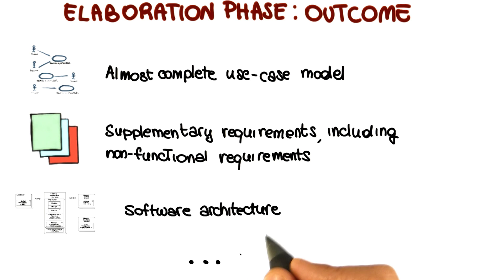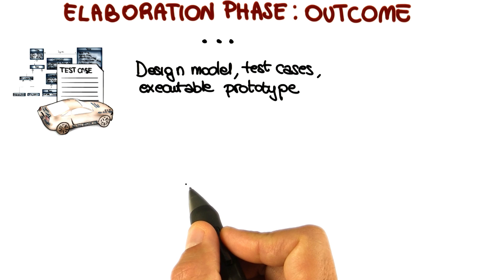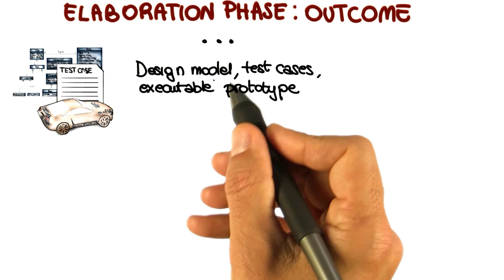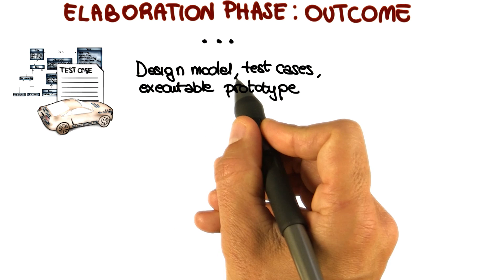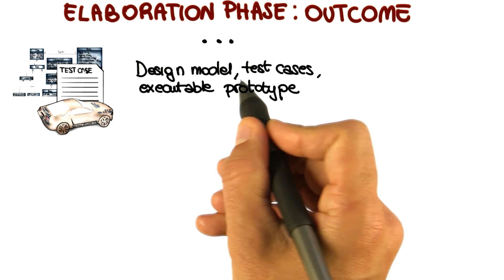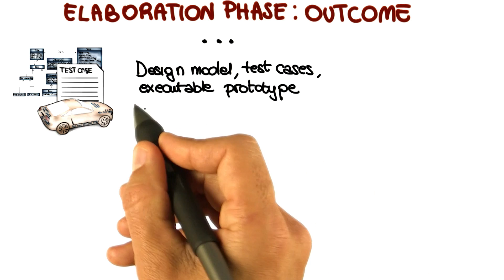In addition to producing a complete architecture for our system, in the elaboration phase we also define the lower level design for the system. Therefore, as part of this phase, we produce as deliverables a design model, and together with that, a complete set of test cases and an executable prototype.